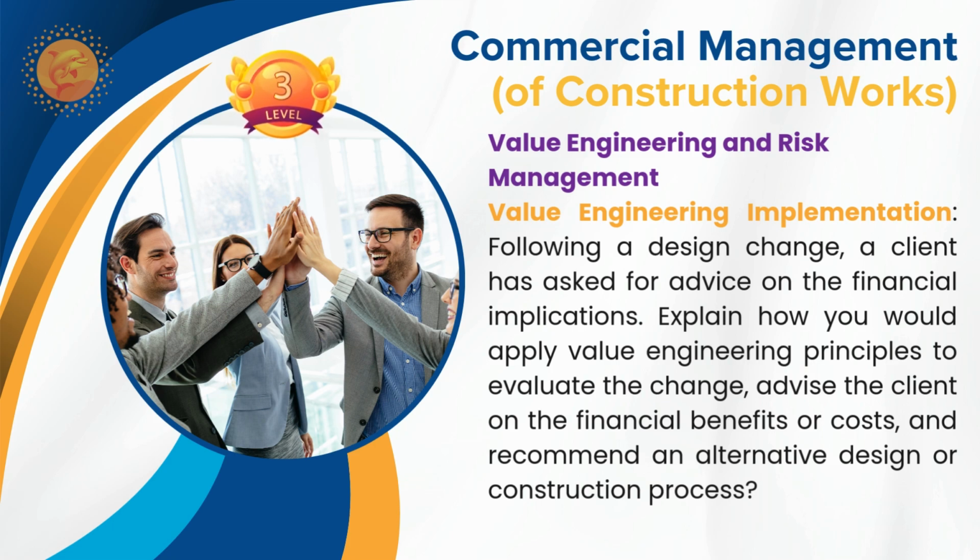So whenever you receive a requirement from the employer for the change proposal, he will instruct you with the proposal requirement. Regarding these questions, the consultant may issue the request to the contractor for the value engineering before implementing the changes, to give the inputs to the employer or designer with the cost impact and the time impact also.